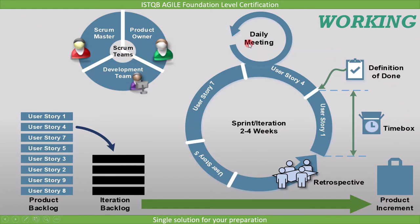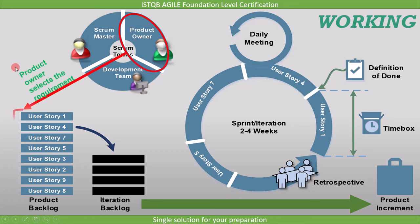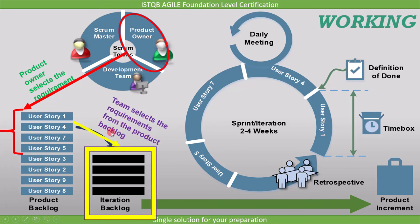Now let's see the workflow to understand how these instruments work in real time. First, the product owner selects the requirement which needs to be implemented. Then the team selects the requirement from the Product Backlog which they will implement in the current sprint — this is called the Iteration Backlog or Sprint Backlog. The cycle in which the Sprint Backlog is implemented is called Sprint. The next sprint is then selected and the process continues until all requirements in the Product Backlog are implemented, which is referred to as Product Increment.